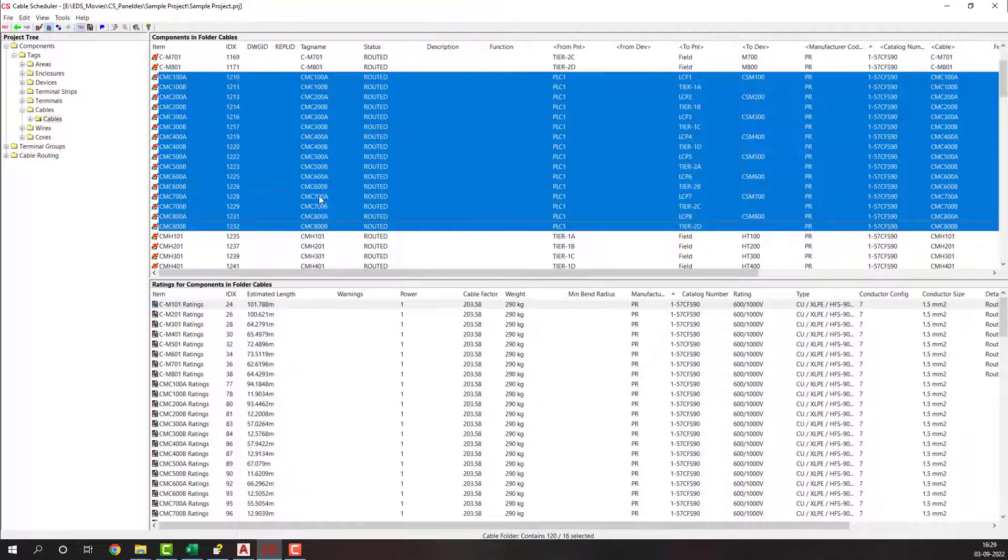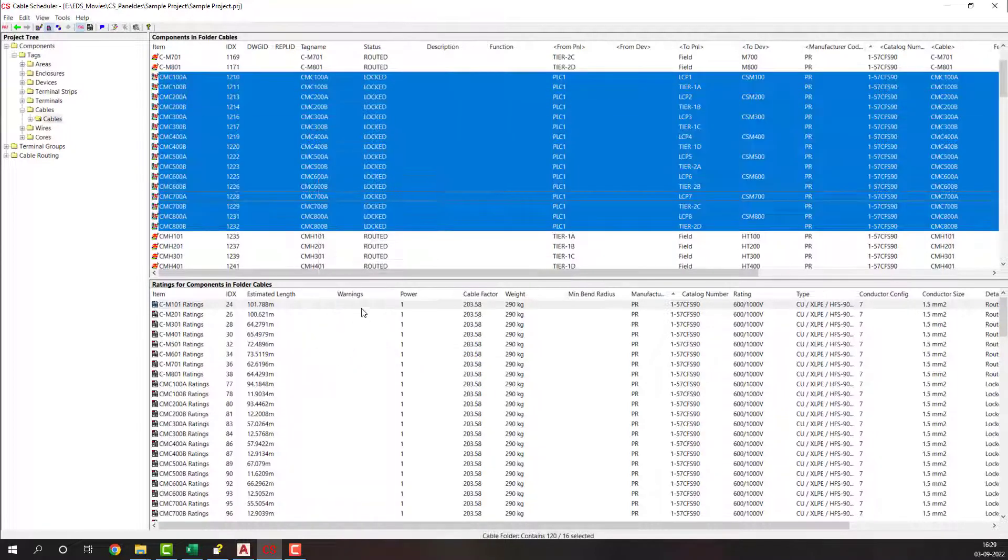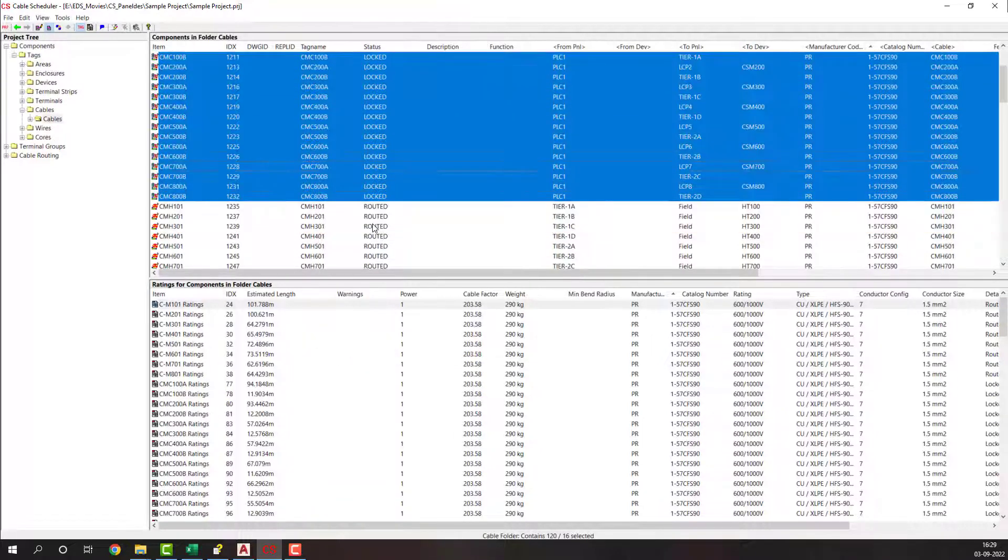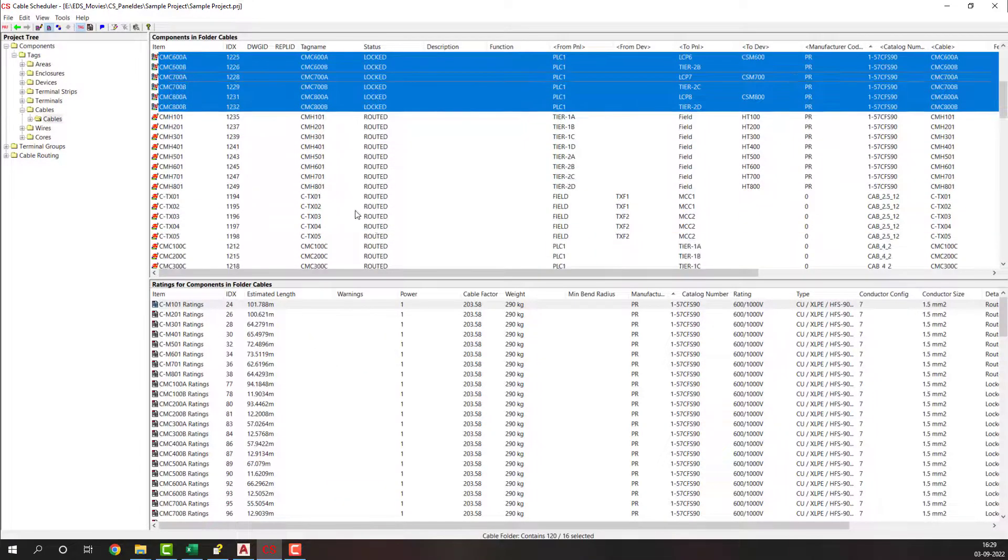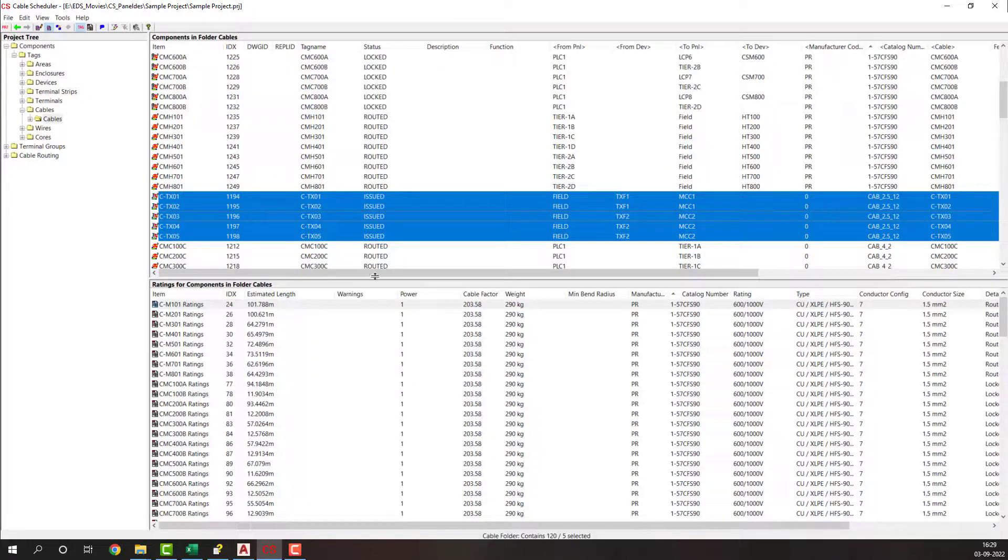Once pulled on-site, you can mark as pulled and add or import installation details such as install and test dates, contractor information, and so on.